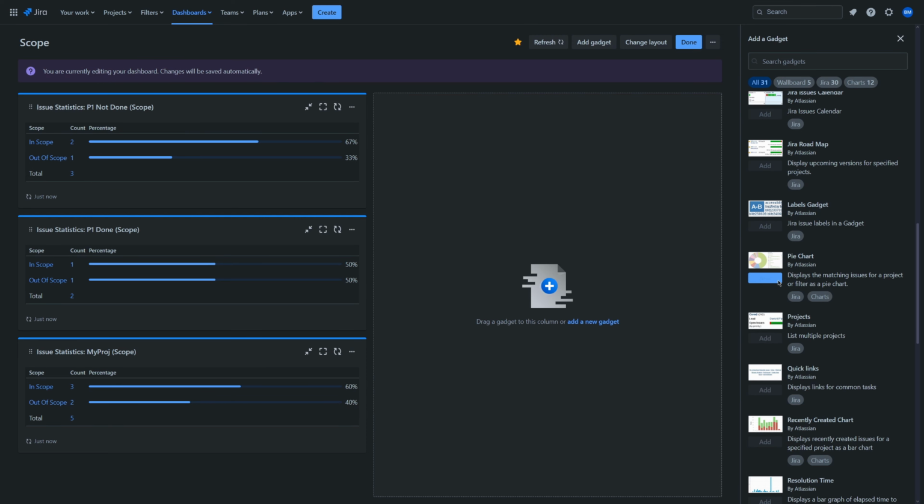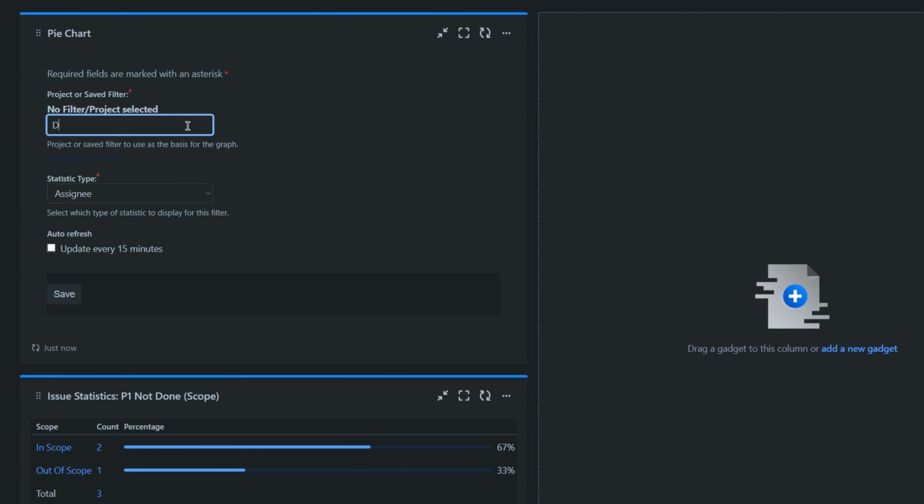Of course, we need to make sure to get the approval when cutting features. This also helps to communicate the project status. You can easily find out now what has been compromised in favor of other features that were not in the specs originally. And you can also help your customer communicate to his management when certain features have to be cut. You also get a feeling of how much the project has drifted when you check the completed tasks in scope versus the completed tasks out of scope.